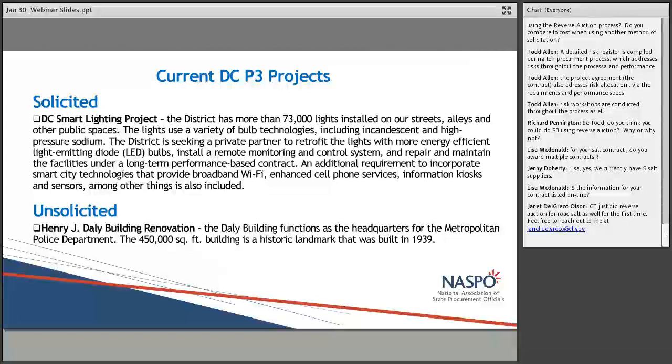Also, there are provisions for alternative technical concepts, and in some cases there could be interim submissions to make sure we're all on the same page as far as where the offer is coming from and the response at that point in time. So by the time we actually get to the final submission, the requirement has been consolidated. Everyone's concerns in the smaller pool have been addressed in the final RFP. So that should deal with your question about refining the requirement, making sure we're getting the best value and the best overall deliverable based on the need of the public sector.